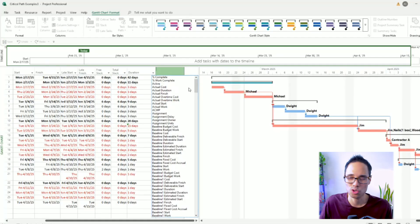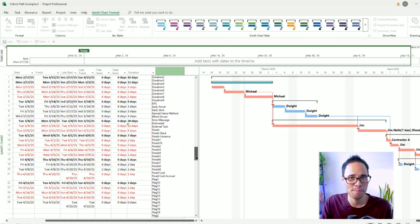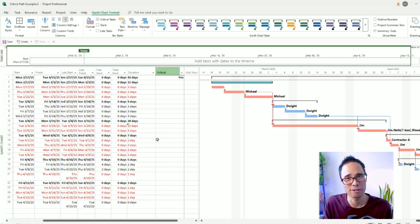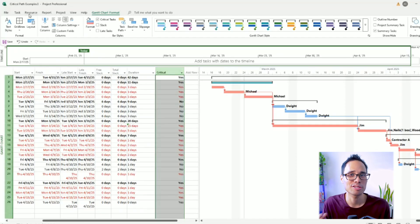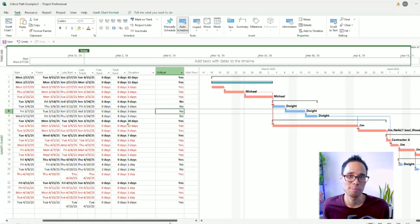Click on add new column, scroll all the way down in the menu until you find and you can choose the option for critical. After you do that, you should now see a yes or no if a task is on the critical path.